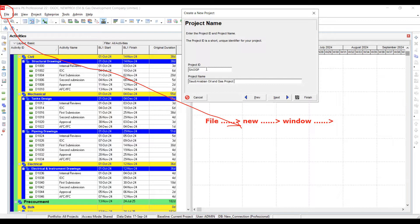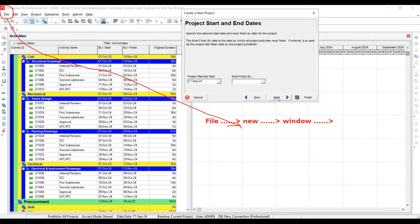You don't make your project name by your own will. When you are going to work in a professional field, you have to consult your contract documents. On the top of your project contract, there are mentioned salient features: project name, project milestones, project start date, and finish date. The contract is going to help you out.